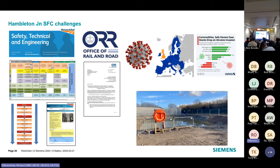Of course, then we had Brexit. Most of our equipment is off the shelf, which we assemble on site, and we prefer that because off-the-shelf equipment is readily available rather than bespoke customized equipment. The Brexit hit affected our customs, and when we had time, it affected our program. We also had the Korean War conflict, and that changed commodity prices quite a lot. When we were working in a fixed price environment, it changes your numbers. But we have a remit to deliver as well.